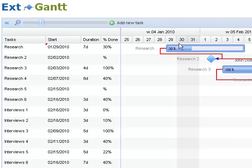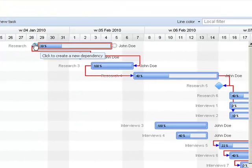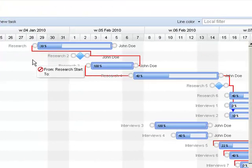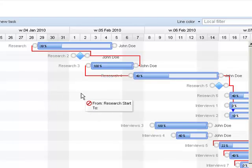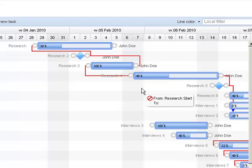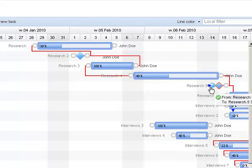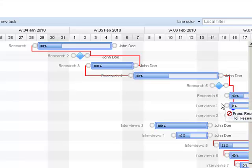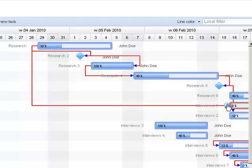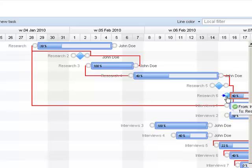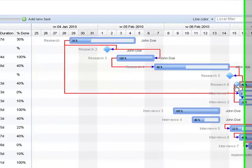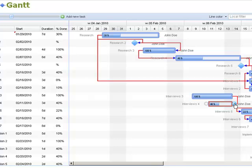Currently, all types of dependencies are supported, like start to start, start to end, end to start and end to end. And how this works is that you click, and when you click, all the other terminals are shown. You can hover over and you see the check mark like this. And you can drop it and it creates an arrow. And I can do start to start. You can pretty much do any type of dependencies.